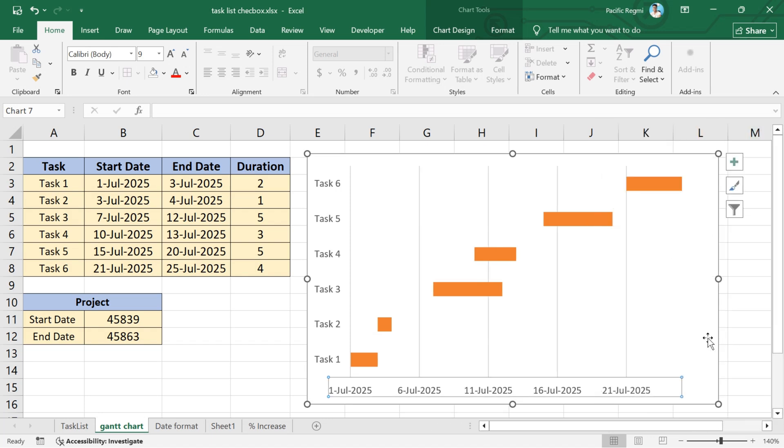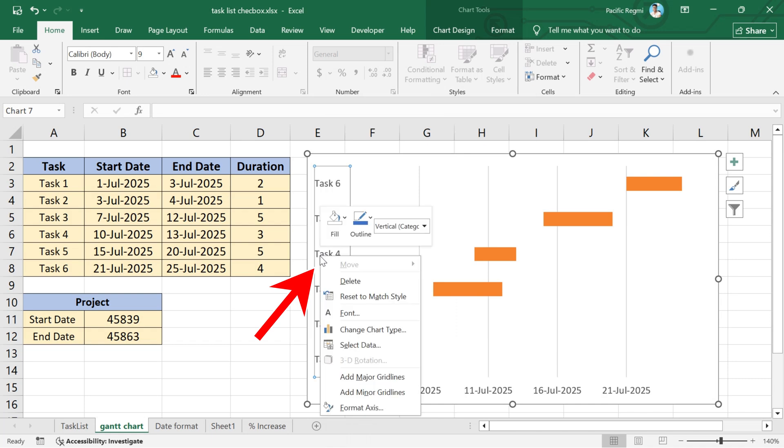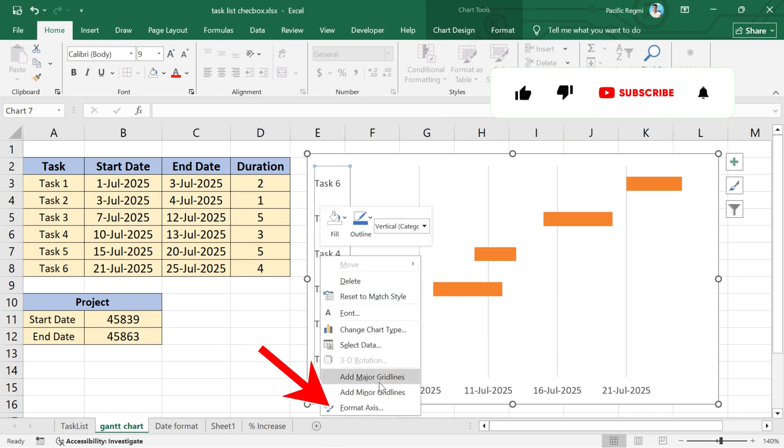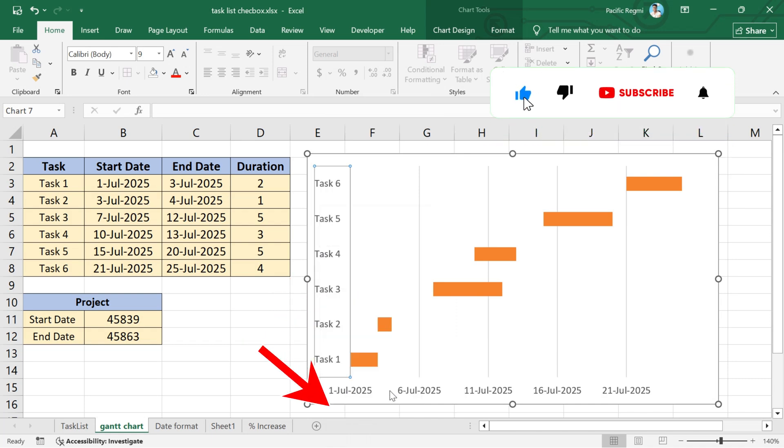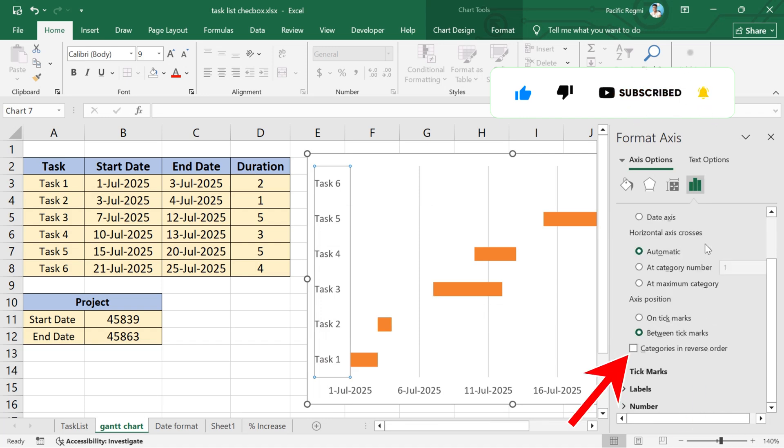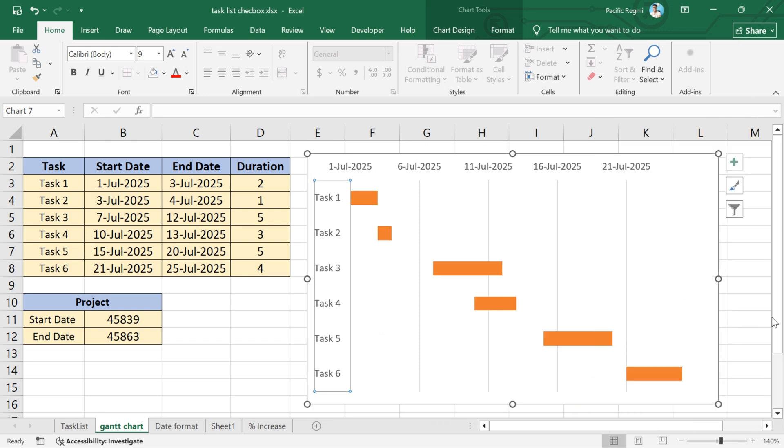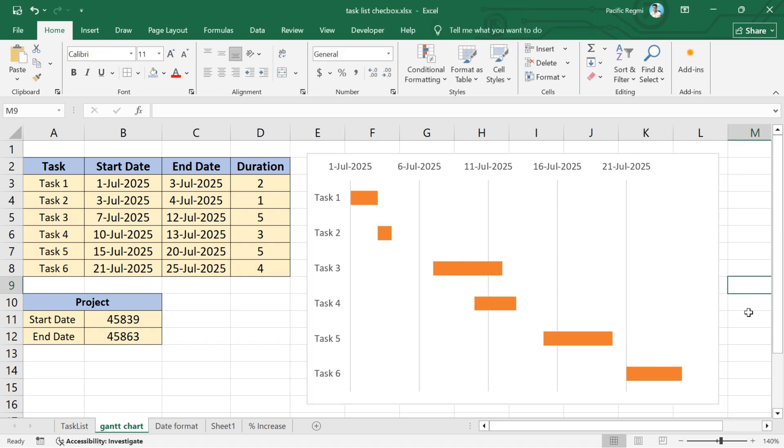Again, select the task labels and right-click on them. A pop-up menu will appear. Select format axis from here. In the axis options, check the box labeled categories in reverse order. This will reorder the tasks from top to bottom as per the original table. Your Gantt chart is now successfully created using your task table.